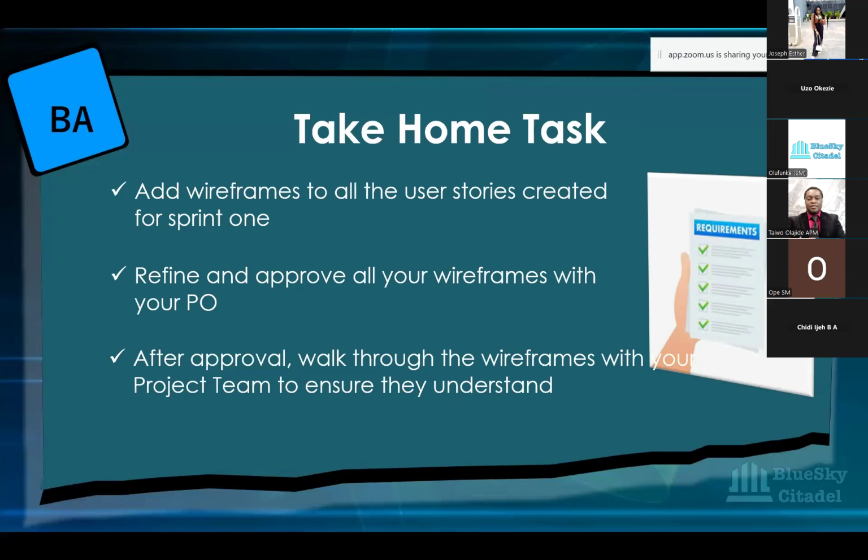Again, I want to repeat: if the information is not in the acceptance criteria, do not put it in the wireframe. And if it's in the wireframe, it must be in your acceptance criteria. I didn't say should be, would be, could be, must be. Those two things have to align. When you say the logo is on the left side, there will be text that says the logo is on the left side. When you say the footer has all these different elements, the story will say the footer has, and you list all the elements: social media, privacy, whatever the footer is.